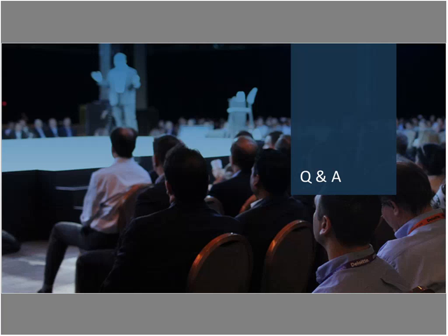All right, one minute, maybe we get in one more question around some of the additional features added in. The question is, for the addition of cost types, do you also allow charge code to be used in the rate matrix and for cost plans? Yes. There's been no change to charge code being included in the rate matrix or in cost plans. So now you have the ability to use both cost type and charge code in both.